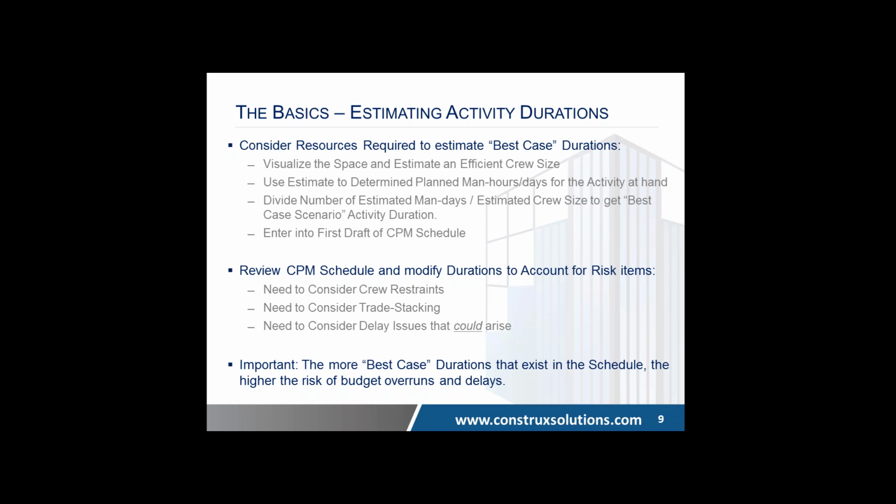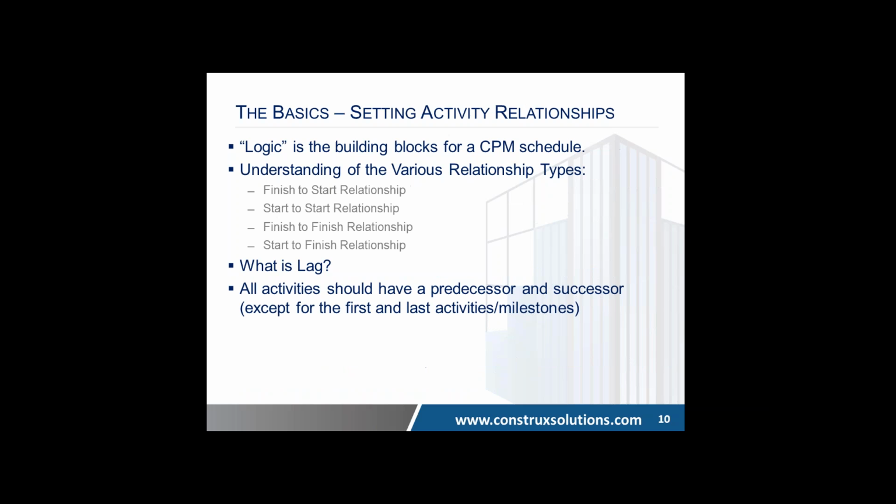Always think about the fact that we're not looking to get things done as quickly as possible, although we are, but we have to be realistic that sometimes things don't work out as planned, and we have to build that in. And obviously, when you do build that in, you have to see what it does to the ultimate schedule end date, and then tweak it, because the contract will tell you when you have to get done, and you have to then go re-risk adjust it so that it fits. And that's generally how you estimate activities.